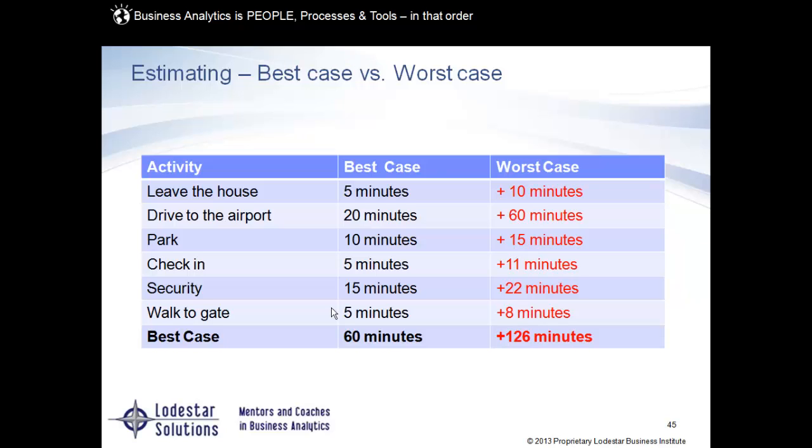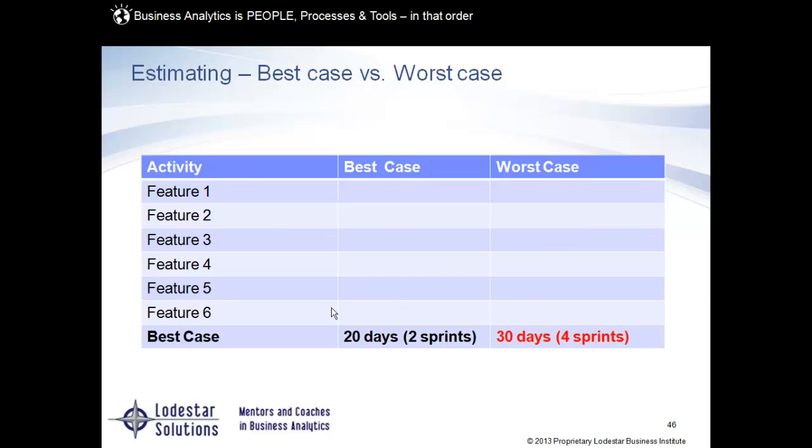So what I come up with is a worst case and a best case. So when we design things in Agile, we say, I will estimate it'll take 4 to 6 weeks. 4 weeks is the best case, 6 weeks is the worst case. There's all these moving parts in projects. I've got to work with this person, and they've got to get something from this person, and I've got to do something on this server, and I've got to wait for this answer. And it's just, so many things are not in our control. So we estimate a best case and a worst case.